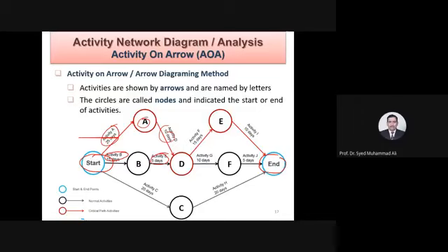So I don't want to do these activities in series. I don't want to wait for 25 days and then order the steel and then start the fabrication. I want to start along with the excavation. The moment the excavation starts, the steel fabrication will also start, because I have the drawings, I know everything, so we can do that, no problem. Similarly, there is another activity C happening for 20 days.